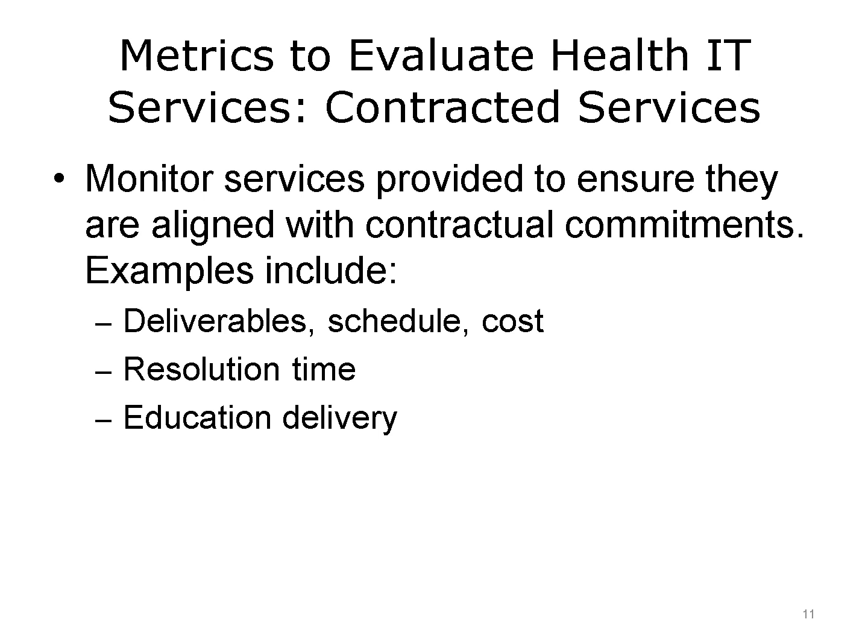For example, has the vendor delivered the expected number of workstations within the schedule that was outlined in the contract? With regular monitoring, any shortcomings can be detected and corrected before the system is implemented. After the system is implemented, additional terms of the contract must be monitored. These include, for example, turnaround times for the resolution of equipment failures, repairs, or system problems, and timely provision of education and training on new product releases.